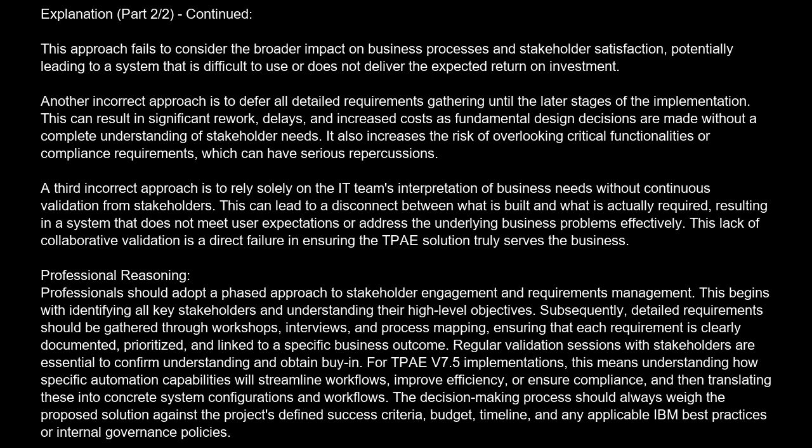Another incorrect approach is to defer all detailed requirements gathering until the later stages of the implementation. This can result in significant rework, delays, and increased costs as fundamental design decisions are made without a complete understanding of stakeholder needs. It also increases the risk of overlooking critical functionalities or compliance requirements, which can have serious repercussions.